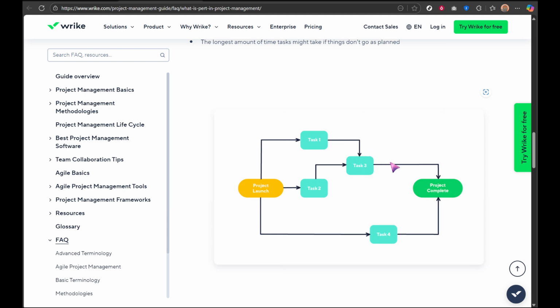At this point, it's crucial to calculate early start and early finish times for each task. The starting task always has an early start of 0. Its early finish is simply its duration. Subsequent tasks will have an early start that is the latest early finish of all its predecessors, and the early finish will then be its early start plus its duration.